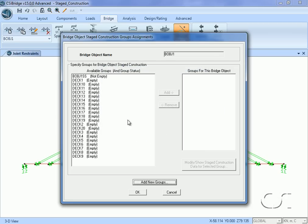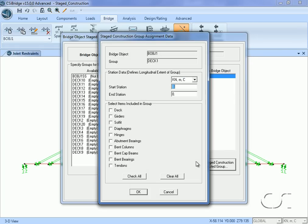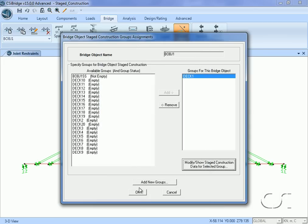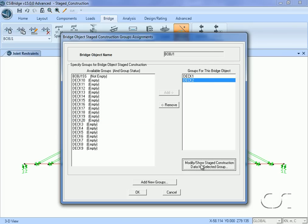Next we will assign the deck segments to these groups. The deck for group one spans from station 90 to station 100. Make sure that the deck item is checked. We will repeat this process for all of the other groups until we reach deck 19.